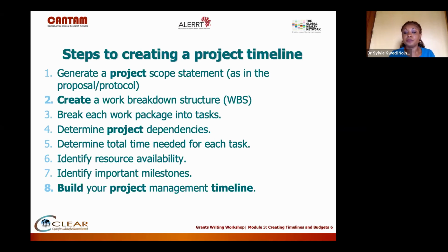We'll see what it is. Once you create your work breakdown structure, you basically divide your packages of work into tasks. You determine your dependency, what comes before what, and then you link them together.